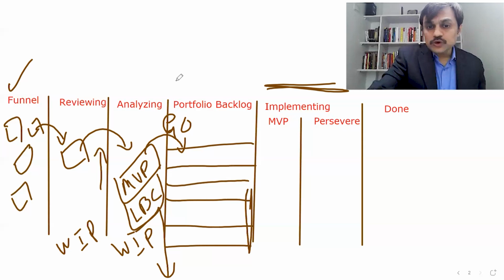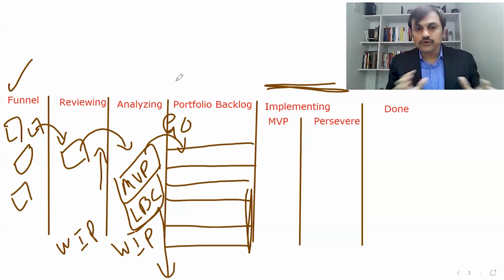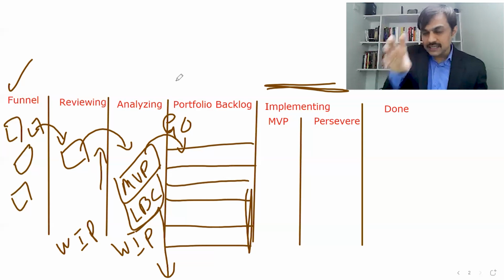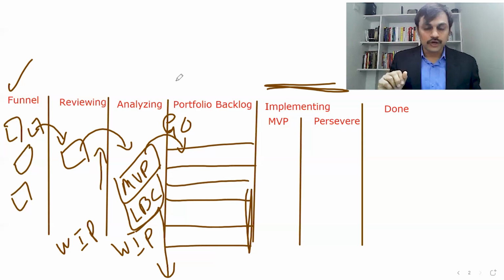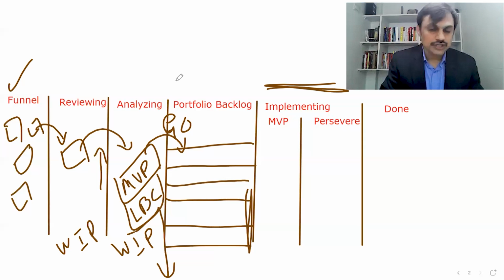So based on the reviews, based on what the agile release trains are doing now, you may have a portfolio strategic review where they see what is in the queue and what is in execution. Based on that, they decide that these are the epics this agile release train should be working on. Since this kind of decision can change the program roadmap and the upcoming PI planning meeting, such input should usually be given ahead of time, say at least 1.5 months before the coming PI planning meeting, so that program teams can come up with the readiness, so that during the PI planning meeting, things can be understood by the agile release train.